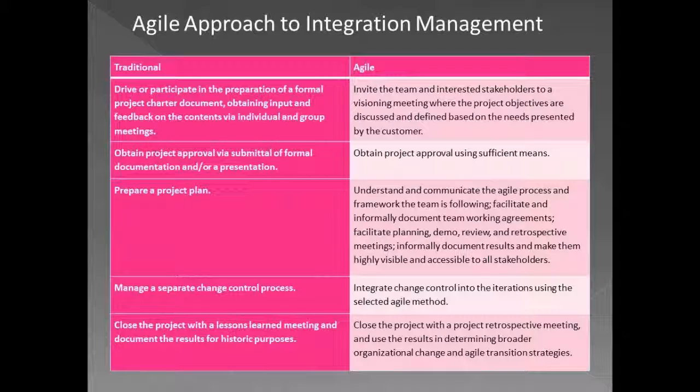And if you see the PMBOK approach for the project charter, you need a proper business case and associated documentation to obtain project approval. Agile doesn't strictly say that there should be a business case or associated documentation, but that means that approval can be obtained by any suitable means.